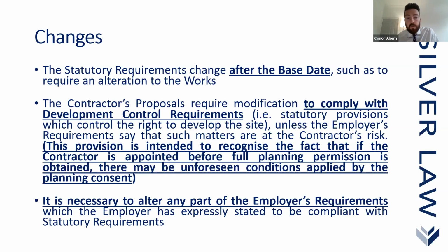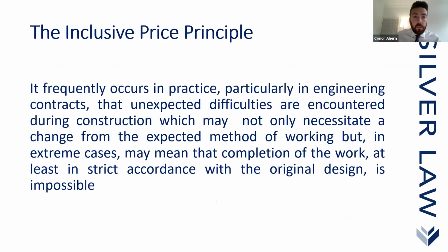Finally, where it is necessary to alter any part of the employer's requirements which the employer has expressly stated to be compliant with statutory requirements, again, in such circumstances, the contractor will be entitled to a variation as a result. Okay, that's it with the design.